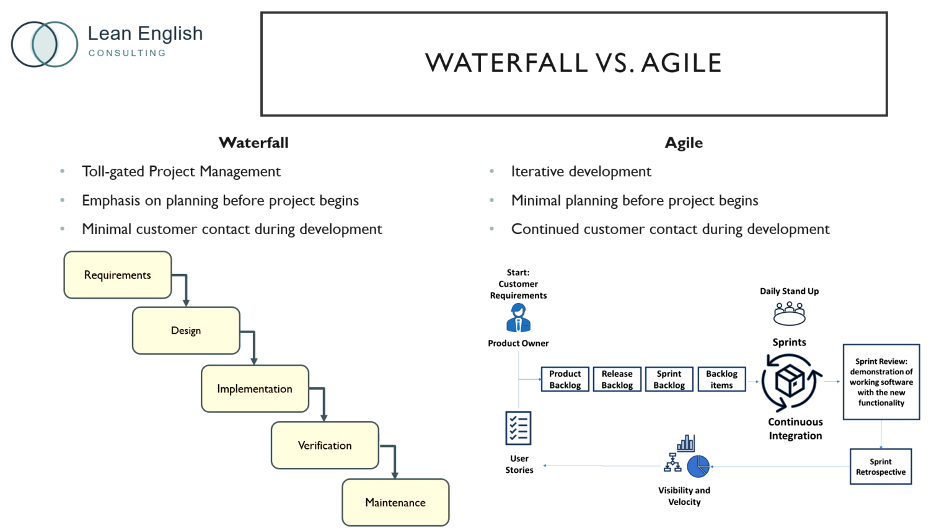As soon as the initial requirements are gathered, they are listed on the product backlog and prioritized by the product owner, the customer's representative in the company. Product owners prioritize the requirements and ensure that the team understands what needs to be created. To make this clearer, the requirements are written in the form of user stories that help the team imagine the functionality that the requirement provides the end user. The end user is the person who will use the software in their daily work.